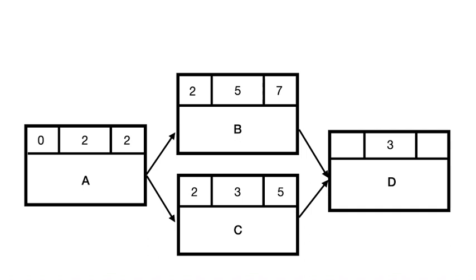We're now going to ascertain what the early start of activity D would be. In order to start activity D, we would have to finish both activity B and activity C. At which day would both activity B and activity C finish? They would both be finished at day 7, and that is exactly why the early start of this activity D would be 7. Could we have put 5?